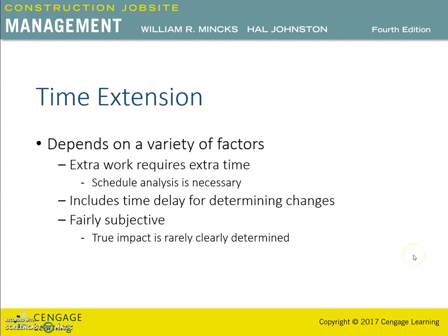The time extension requested by the contractor depends on a variety of factors. Extra work usually requires extra time to the contract. Analysis of the project schedule is necessary to show the impact of this additional work.